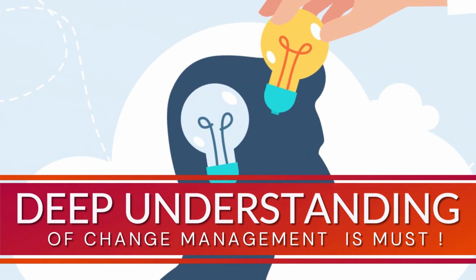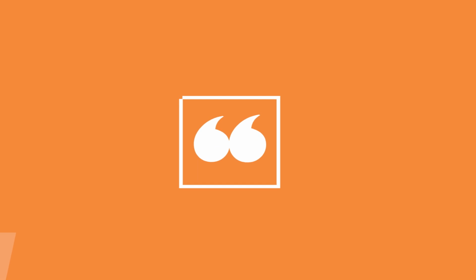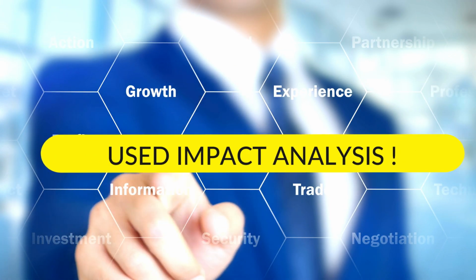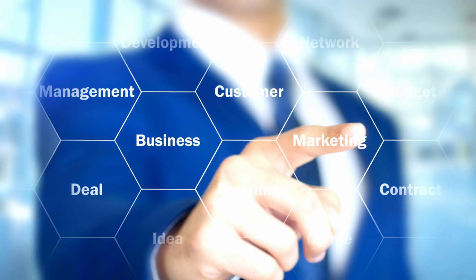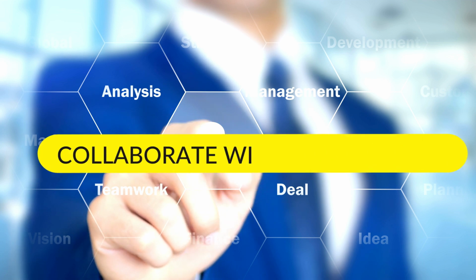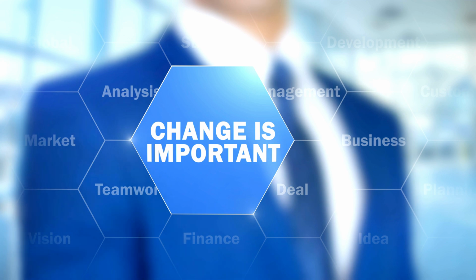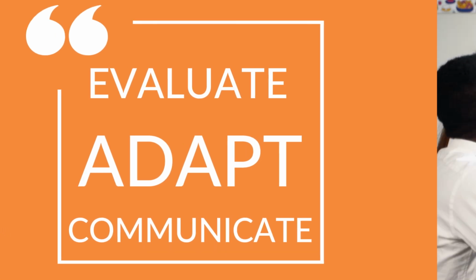That's right. You wouldn't just blindly accept the change and scramble to adjust everything. Instead, you'd want to assess the impact of the change. You could use techniques like impact analysis to understand the potential ripple effects. And then you'd want to work collaboratively with all the stakeholders to reprioritize the backlog or adjust the sprint goals. So it's a lot more than just saying, sure, we can do that. It's about having a structured approach to evaluate, adapt, and communicate those changes effectively.